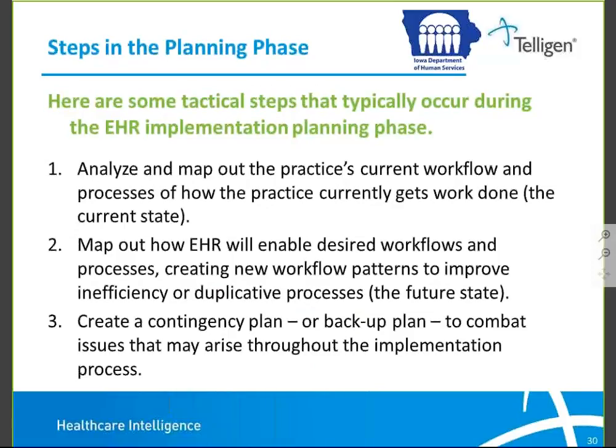So you might wonder, what are some actual tactical steps that we need to be doing? So this is going to get us into those a little bit more here in terms of your planning phase. Number 1, analyze and map out the practice's current workflow and processes of how the practice currently gets your work done. So what is your current state?